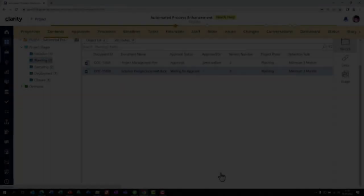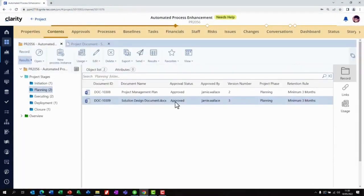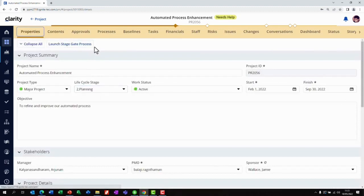The project manager can see that all the documents are approved in Docsis and accordingly can now initiate the stage review process in Clarity. For each step in the stage gate, new documents are required. Once the documents are approved, the stage gate will be automatically approved and the project will advance to the next stage.